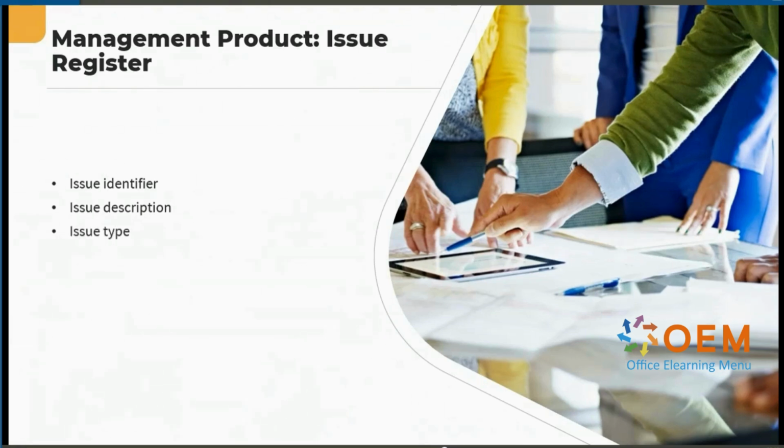We will include the category or type. Is it a problem, concern, external event, business opportunity, request for change, or off specification? And what's the grading? The rating of priority and severity. It's best practice to allocate an issue owner for the issue, and they will then be responsible for managing and monitoring that issue. And the decision, once it's made, will be recorded here.